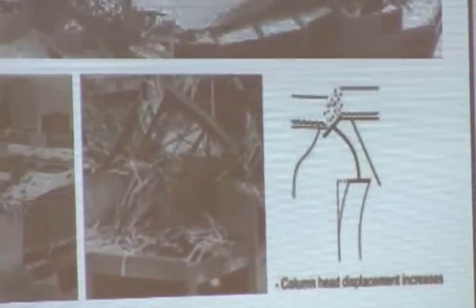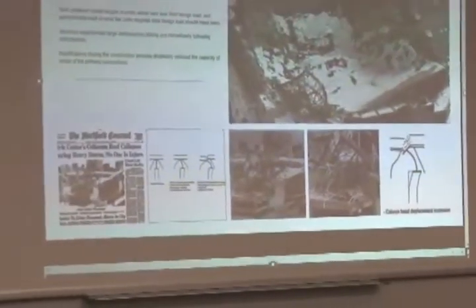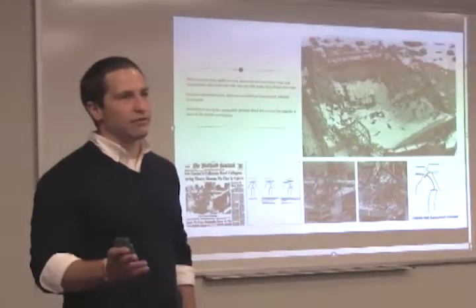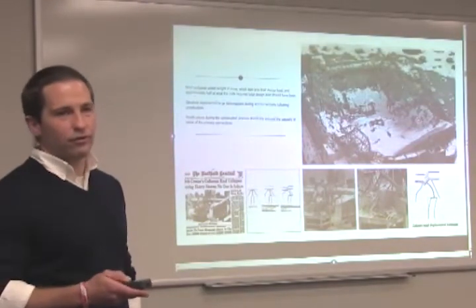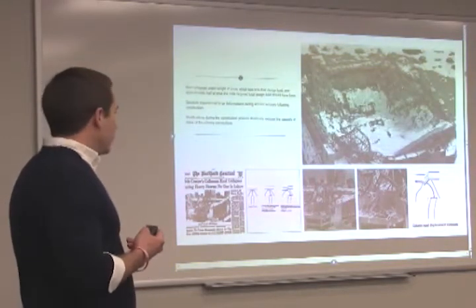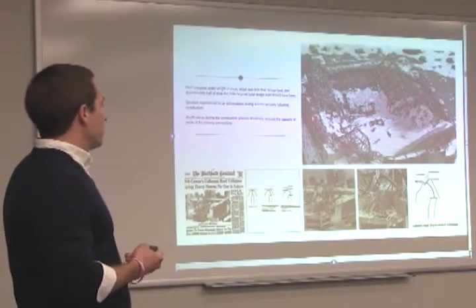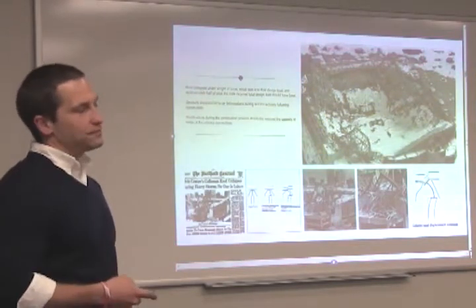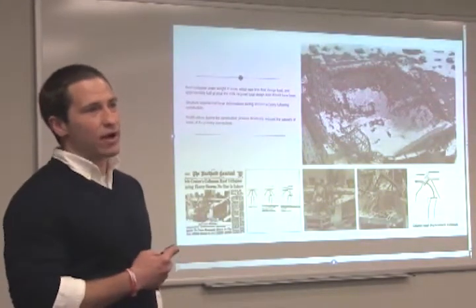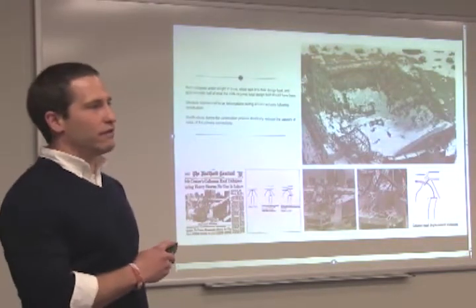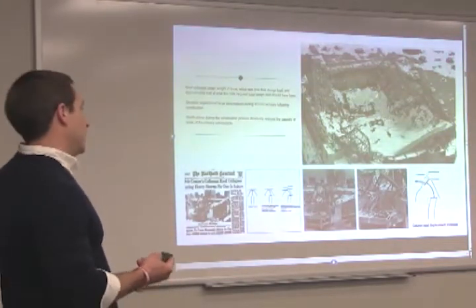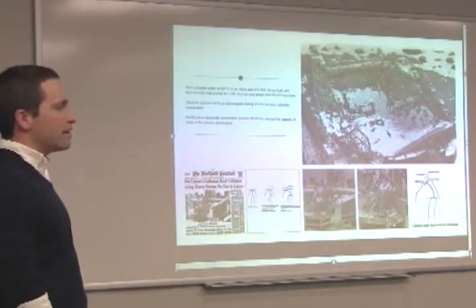The connections didn't get properly reviewed by the inspectors or the structural engineer of record. In both of these cases, the structural engineer of record wasn't properly retained through the construction administration process — not afforded the ability to really look through and make sure their design was being carried out in the field. During construction, there were very large deformations in the roof: 12, 14, 18 inches of sag in those roof members as they went up. Without proper review of this process, the contractor kept moving through and built it. Unfortunately, it came down — but luckily, not a major loss of life.